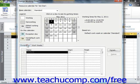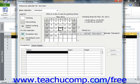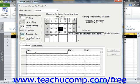To create an exception to the work schedule, click the Exceptions tab. Here you can enter the various days off for the chosen work resource. To do this, you can click on the first day off shown in the calendar if desired. Next, click into the Name column within the Exceptions tab and type a label for the name of the time off that you want into the Name column.